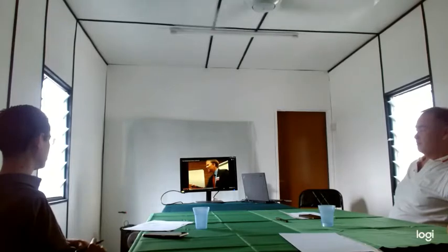You have to look at something called crashing, which is basically to either throw money at one of the tasks to make it shorter, or to look at overlapping tasks, which of course is more risky, to do one at the same time as another. But that may be necessary in order to get the critical path down.